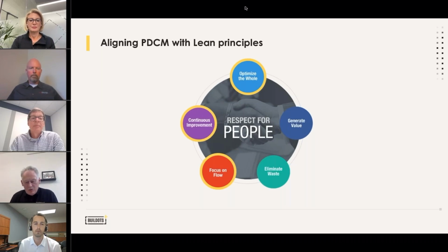Understanding your productivity rate, production rate, making sure that people aren't waiting around while trades before are completed. And as I say, if you come back to the wonderful tool of PPC, if somebody's telling you that they're going to do X amount of footage next week and they only actually deliver half of it, in my previous role as group chief exec, how do I rely on that project team to tell me when they're going to finish the whole project if they can't tell me what they're going to do next week?